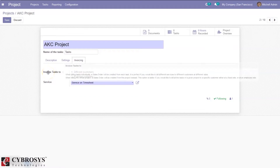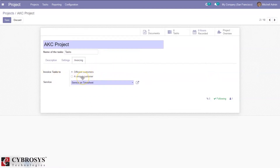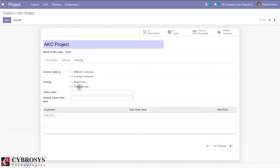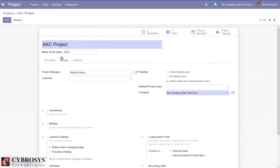When you enable the billable option, you can see an additional tab 'Invoices'. This is used to create invoices per task for different customers or for a unique customer. When you choose the first option, you only have to set the service product. If you choose the second option, you can create invoice based on project rate or employee rate, and set the sale order and default sale order item. If you choose employee rate, you have to add lines with the sale order item and unit price. I'm setting different customers so we can create invoice on task for different customers.